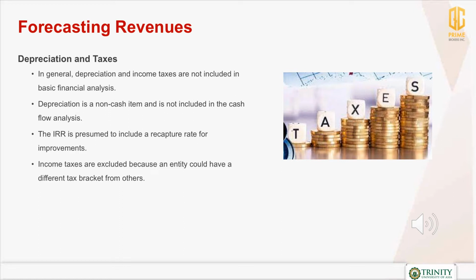Notes on depreciation and taxes. In general, depreciation and income taxes are not included in basic financial analysis. Depreciation is a non-cash item and is not included in the cash flow analysis. The IRR, or internal rate of return, is presumed to include a recapture rate for improvements. In addition, income taxes are excluded because an entity could have a different tax bracket from others.